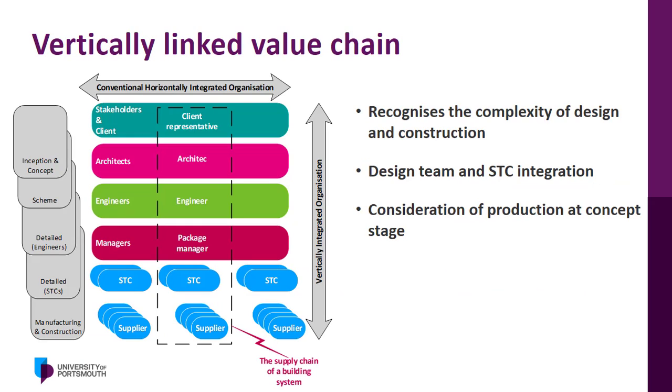Technology clusters are vertically linked value chains. What does this mean? People create values when they produce ideas or products or provide services, etc. The value chain of any building component develops vertically from a concept to an installed product on site, while the usual integration of the project team is horizontal, i.e. the client team works on their own, the same with the designers and others. When creating your project organization, you need to acknowledge the vertical development of building components in order to preserve the value chain and eliminate the loss of value, rework, or unnecessary iterations.